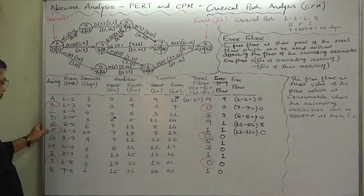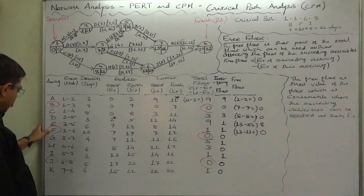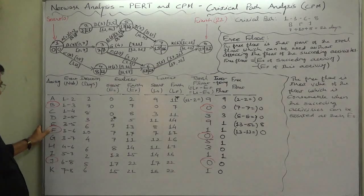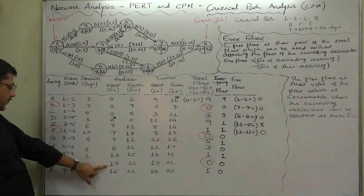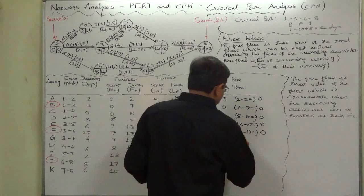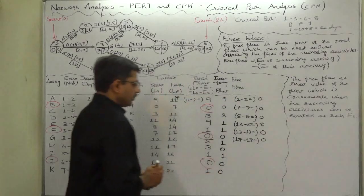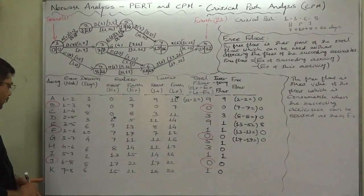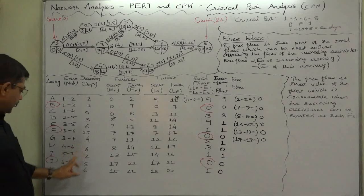In case of F, the free float would be 0 because F is a critical activity. Let's check: the successor of F is J. Earliest start time of J is 17 and earliest finish time of F is 17, so 17 minus 17 equals 0. It must be 0 because it is a critical activity.